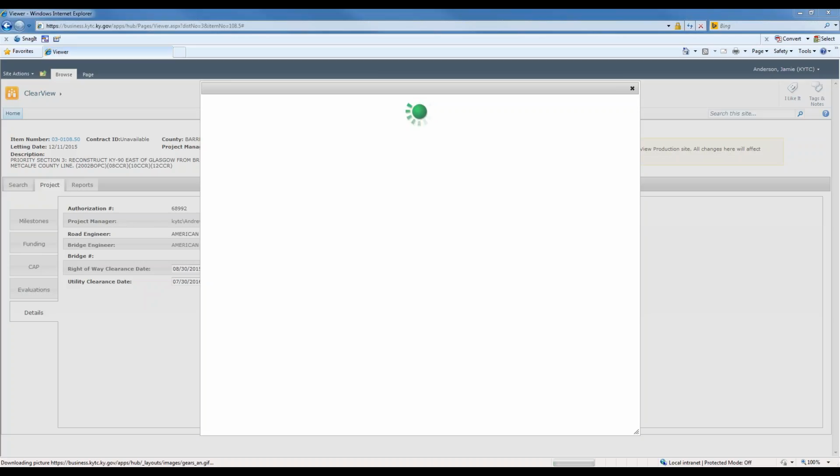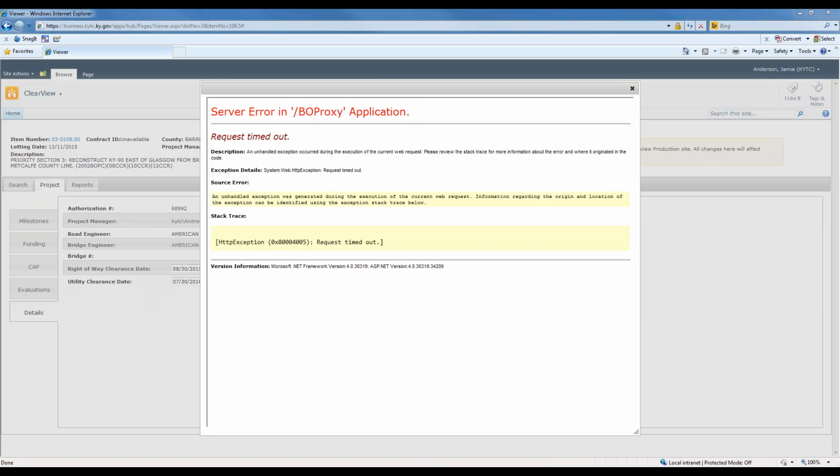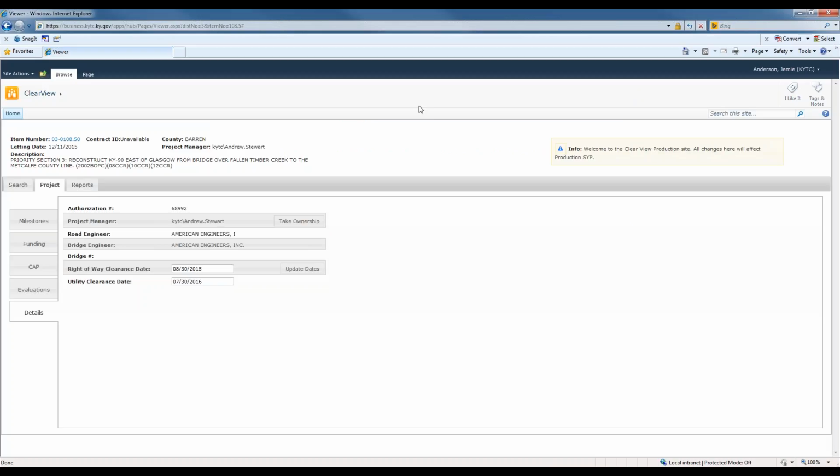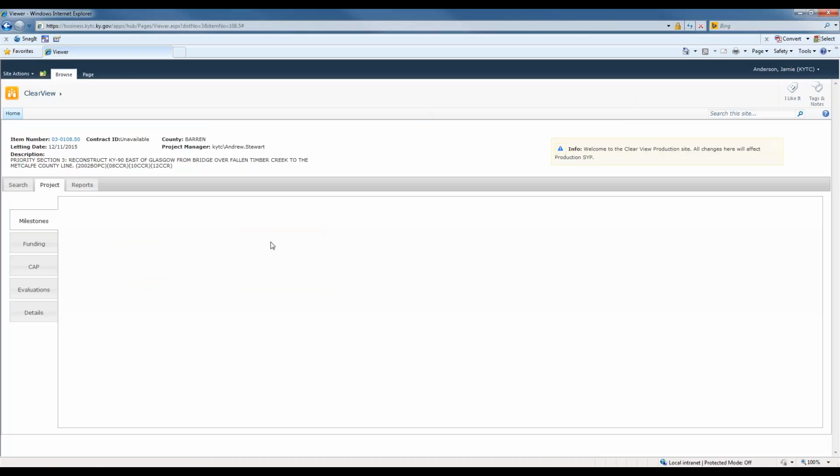Okay, we actually do have a question that's popped up, Jamie. On the milestone dates, there are multiple lines/dates that can be entered for each entry. How does the SYP know what to use? Yeah, the SYP is always going to pull the recent date on the status reports. There are multiple values under each milestone.